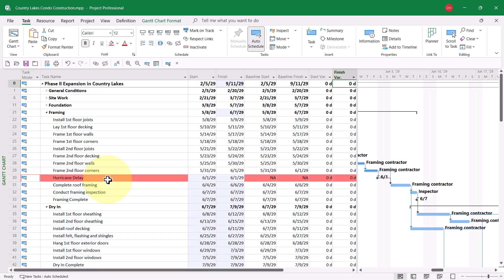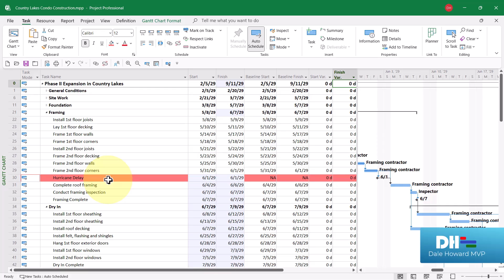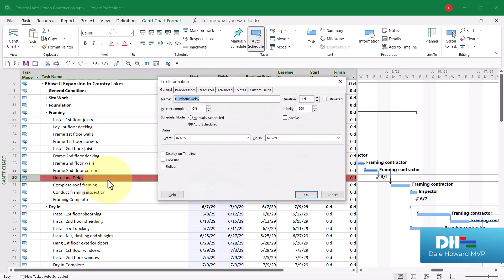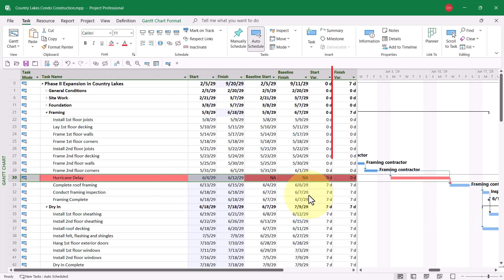The other thing I want you to be aware of is, as a user of the standard version of Microsoft Project, after you've temporarily canceled the task by setting its duration to 0 days, you'll also need to go back in and put in whatever duration is needed for the delay. In my case, that was 7 days.